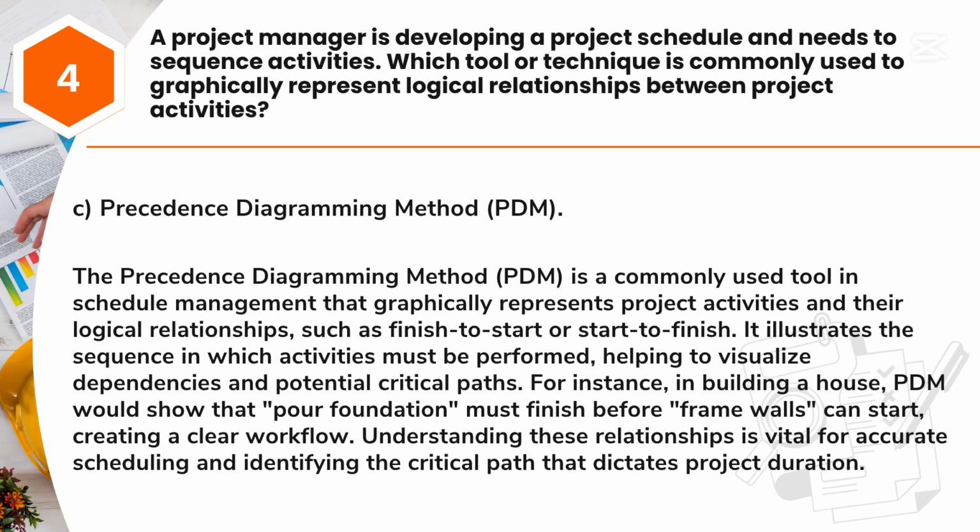For instance, in building a house, PDM would show that pour foundation must finish before frame walls can start, creating a clear workflow. Understanding these relationships is vital for accurate scheduling and identifying the critical path that dictates project duration.